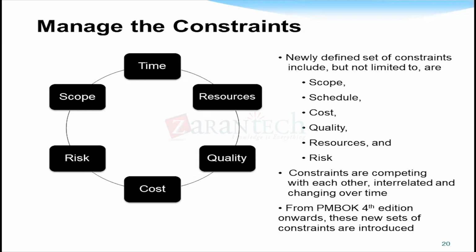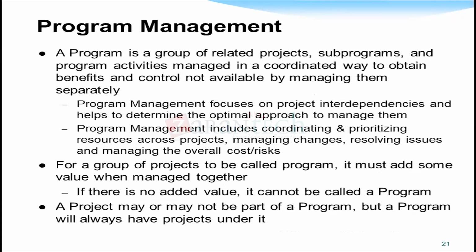Or if the project is having, say, only 2 resources working on it, therefore you are increasing the duration for the project. For duration, again, time: how many requirements can only 2 people implement? What is the scope? Therefore, all are interlinked. All these are called project constraints. Therefore, you should know about these constraints. Whenever you want to know the health of the project, just measure these parameters. You will know at what stage the project is, or what the health of the project is.